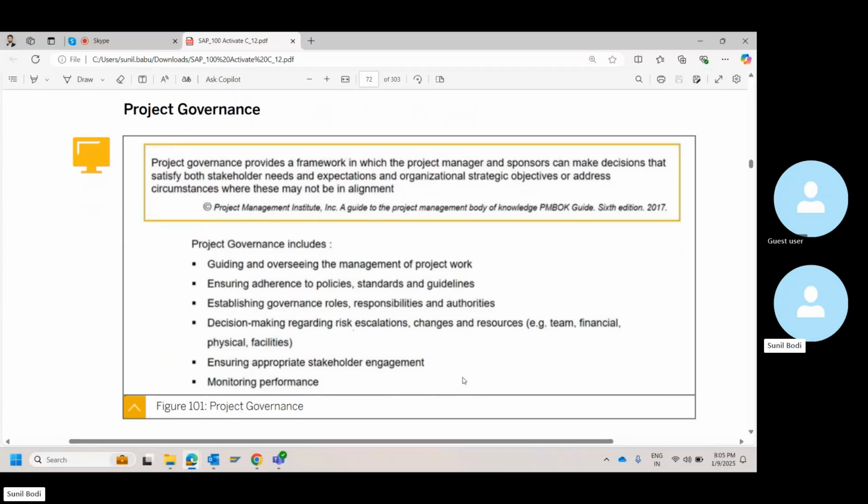Then daily Scrum meeting invites will be sent, recordings have to be shared, detailed documentation has to be submitted, and project shared folder and other team access should be given. So there will be a certain checklist that you can prepare for you to swap resources in between a project.